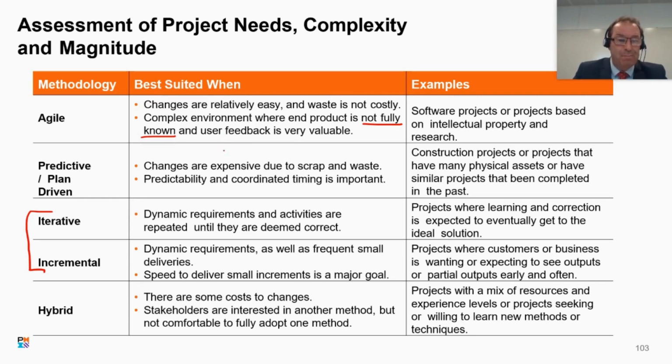Predictive or plan-driven, this is where you start realizing changes can be expensive. For example, if you start building a property, an office block, and then you've put the foundations in, you're up to the first floor, and then you think, oh, you know what, I don't like that, let's change our mind. And all the builders look at you and they go, really, boss? Are we really doing this? Because we've got to demolish what we've built so far. We've got to excavate all the footings. This is going to be mega expensive.